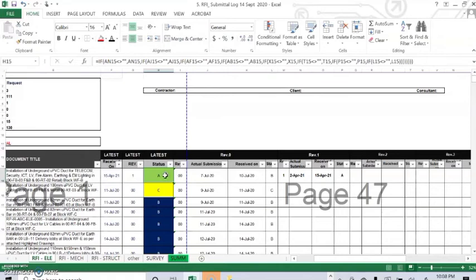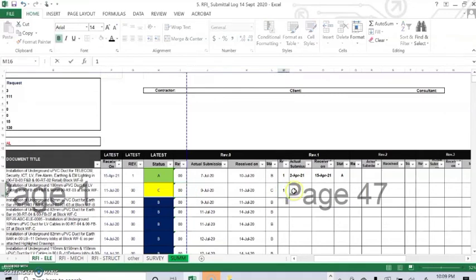It's the same logical IF function. So moving on, revision 0 was C, revise and resubmit. We have to get the A approval or the B approval, assuming that we have submitted in revision 1, and we're just copying the dates here, and then we place the revise and resubmit in revision 1.